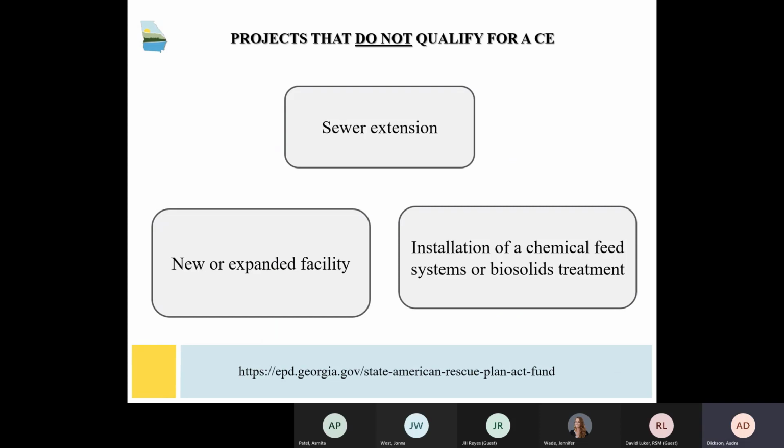Notices of no significant impact are for projects that could have a significant effect and impact on the environment. Project examples that will be covered under a non-Z include increasing the level of treatment to meet a new permit limit, expanding a treatment plant to discharge more treated wastewater, installing a new biosolids facility at a wastewater treatment plant. Other projects could be constructing new pump stations, expanding sewer lines to new areas of the municipality, and increasing the size of sewer lines for sewer-related projects.